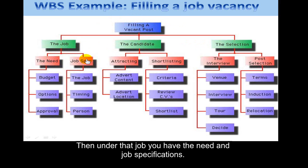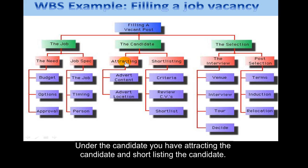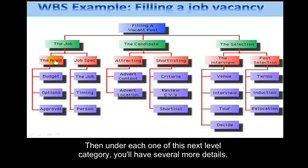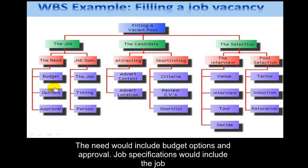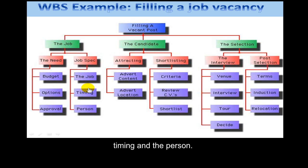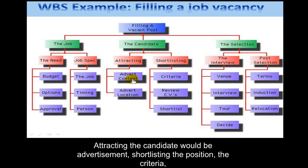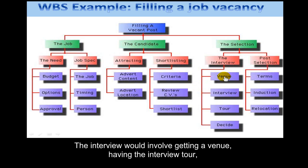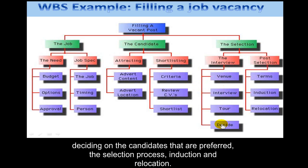Under the job, you have the need and job specifications. Under the candidate, you have attracting the candidate, shortlisting the candidate. The selection includes the interview and post-selection. Under each next-level category, you'll have several more details. The need would include budget, options, and approval. Job specifications would include the job timing and the person. Attracting the candidate would cover advertisement, content, and location. Shortlisting includes the criteria and reviewing CVs or job applications. The interview would involve getting a venue, having the interview, and deciding on preferred candidates. The selection process covers terms, induction, and relocation.